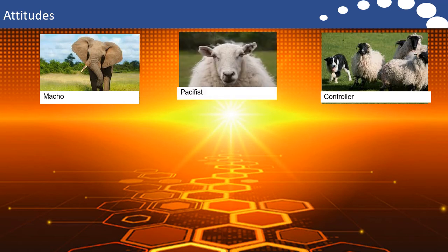Then we've got the pacifist approach. Well, let's not worry about it. It might not happen. Or we'll just keep quiet. We won't say anything about that one. I think the big danger of the pacifist approach is that the right people don't know about risk at the right time. We look at some major embarrassing things like Crossrail in London, where suddenly 3 months from going live, it was going to be 2 years late. People were basically ignoring risks. Pacifist, looking at the risk going, well, nobody else is worrying about it. Why should I say anything?